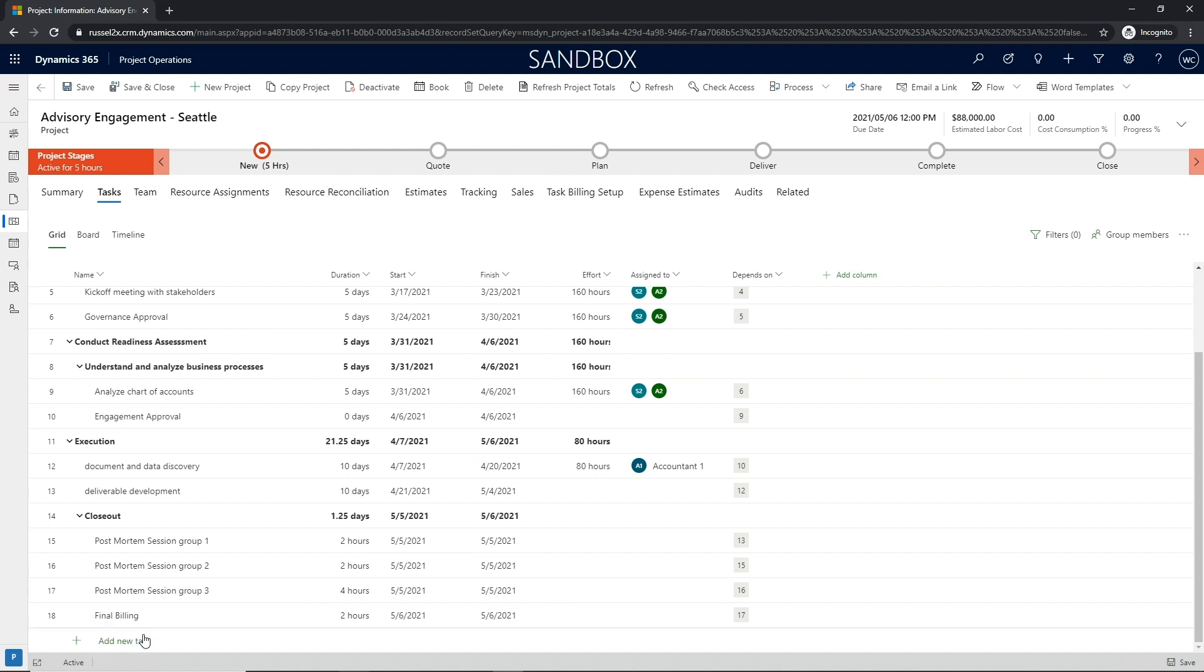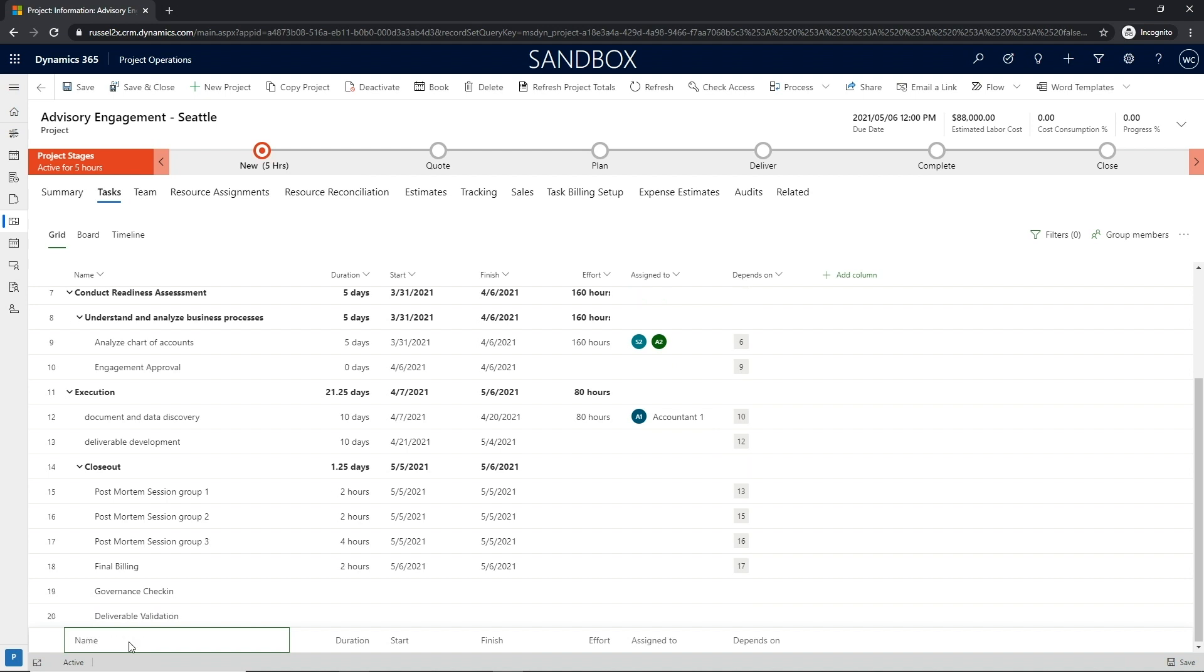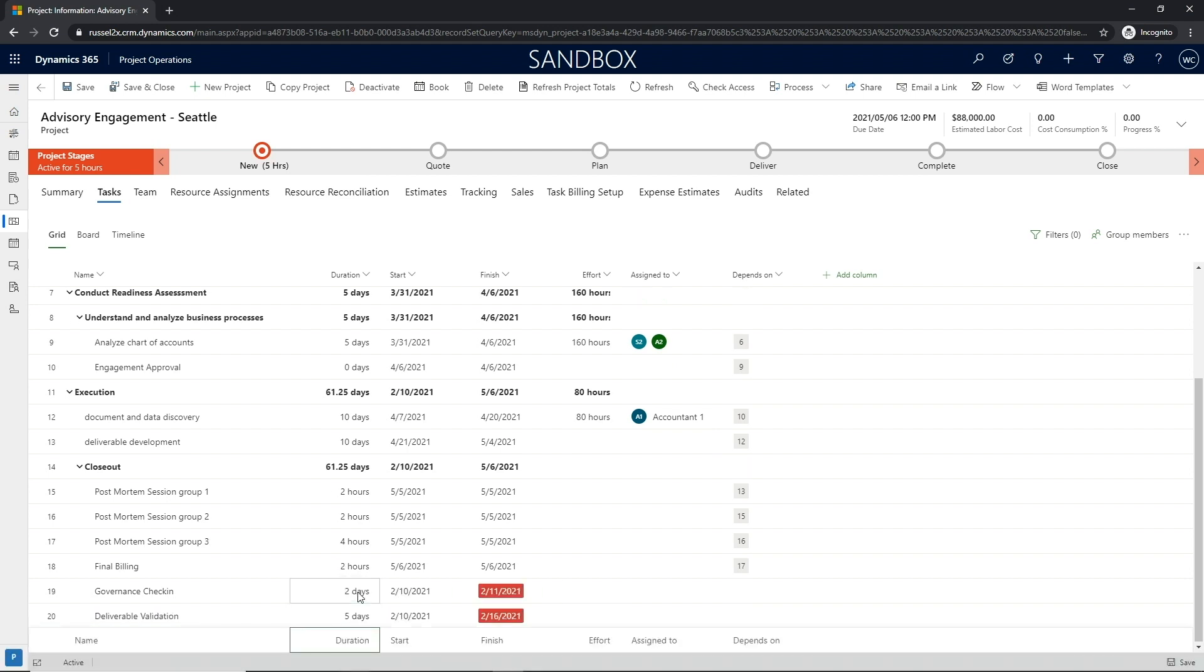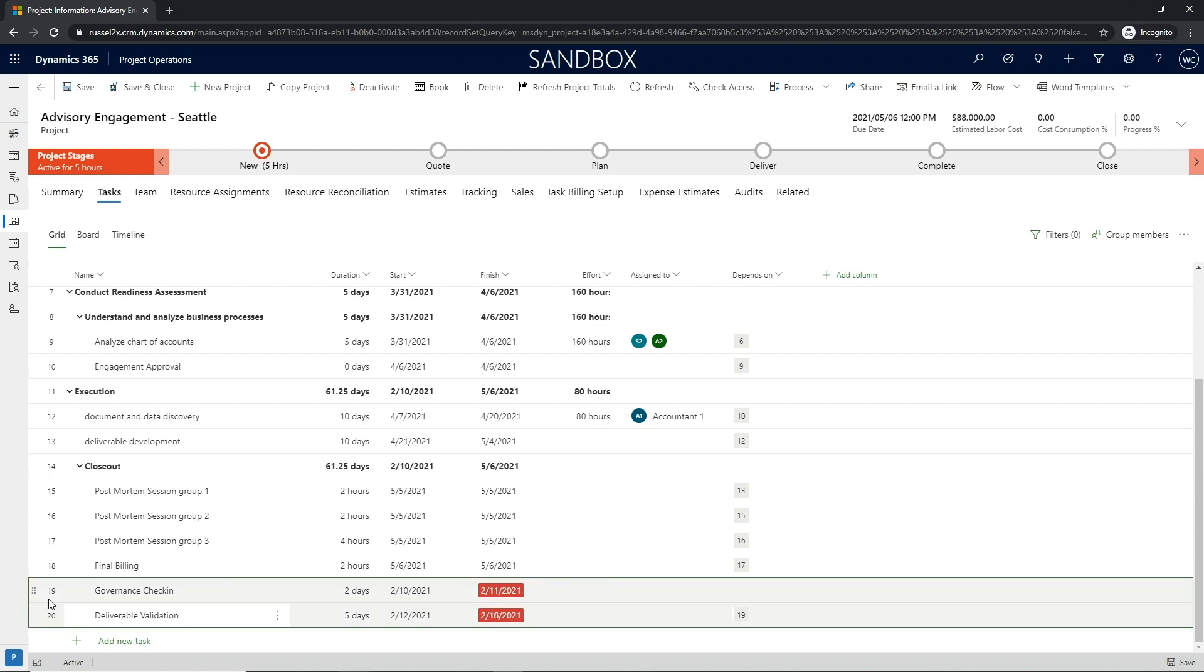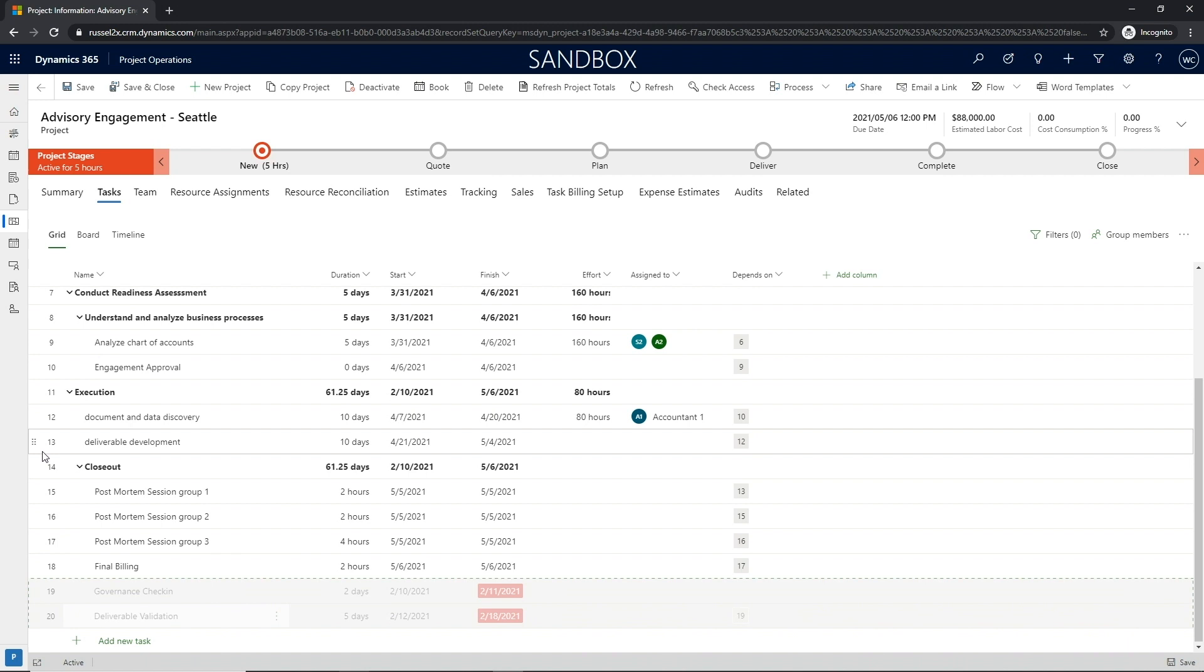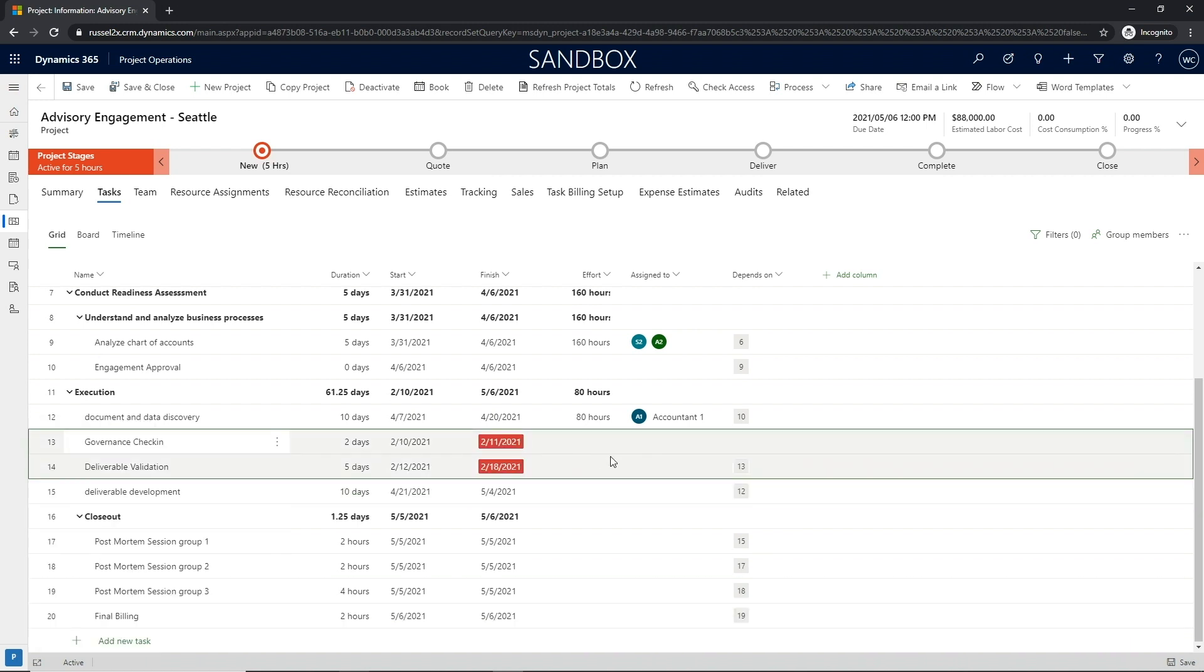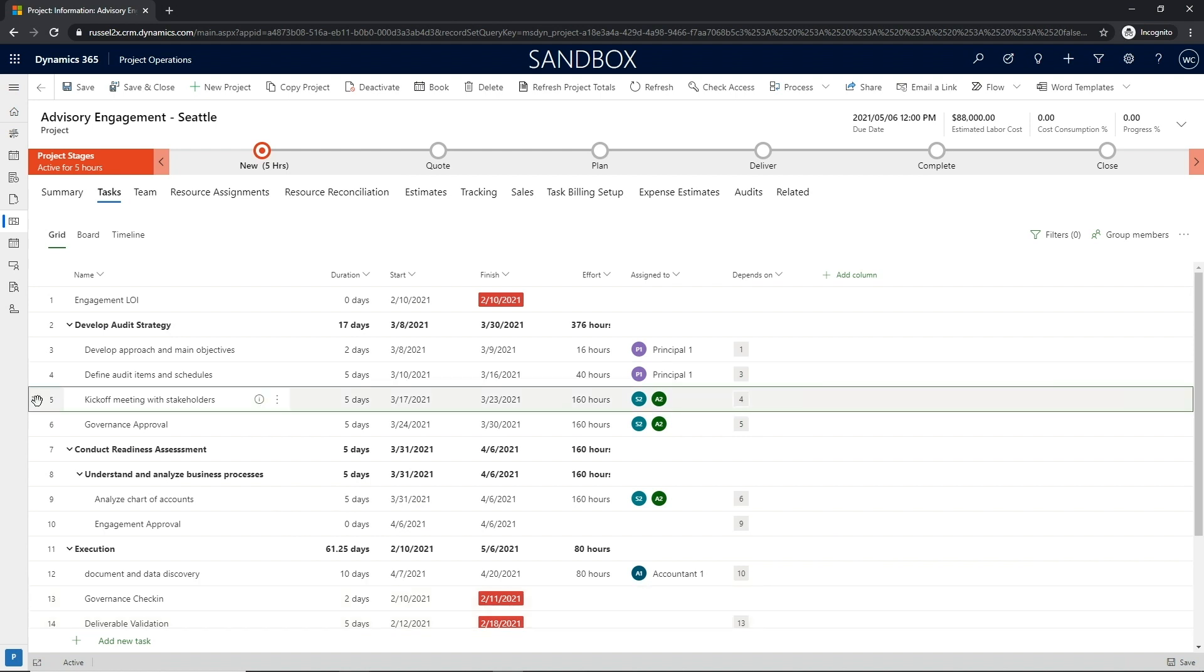Using the fixed duration schedule mode, users can define a task where they're able to hold duration constant regardless of the changes to the effort, thus allowing project managers to focus on planned delivery dates. Project Operations also supports scenarios when a task will start and end within the same day, as well as it provides support for milestones, otherwise known as zero duration tasks.